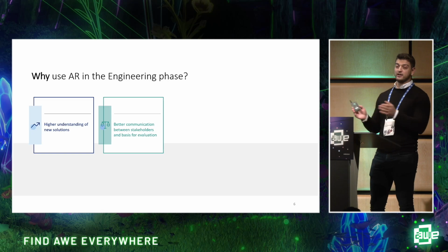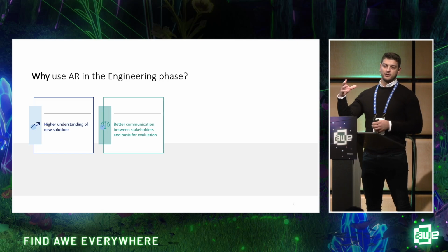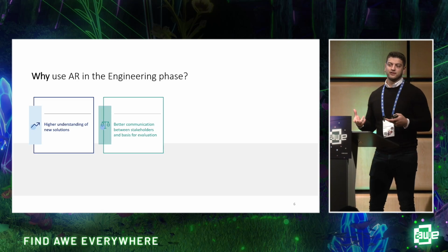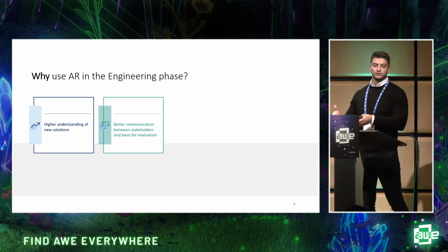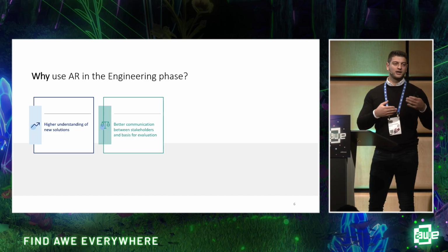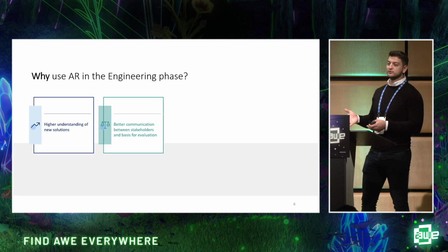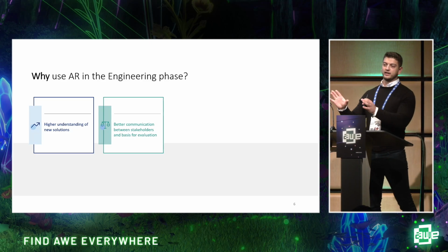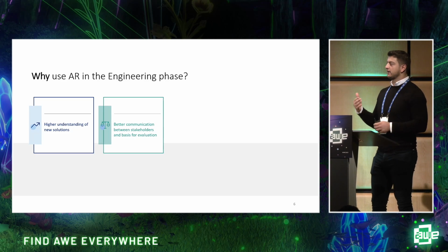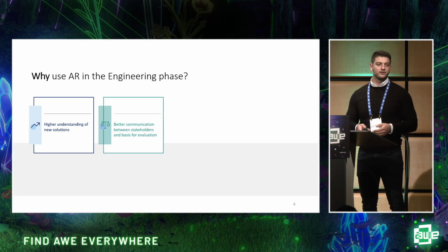So now we have a very rigid process, where we actually get the operators to do the physical work, where we outline the actual work that they will have to do when the robot is installed, and we actually get them to physically go and do it, and we look and analyze. And in that way, we ensure that they get through every single point that is important.